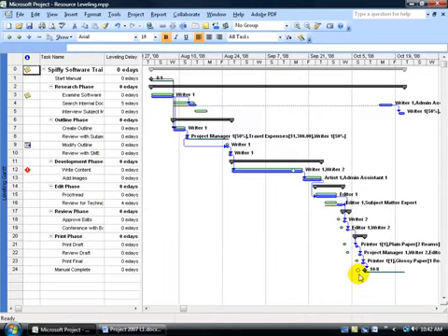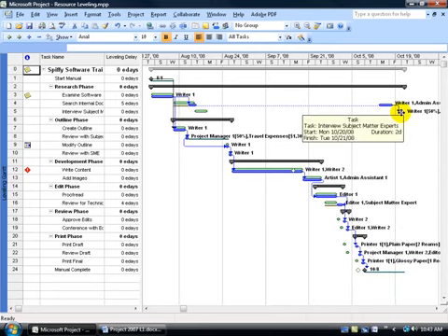Again, its original pre-level date was October the 6th, and then because of the sequential successors here, it breaks it down to October the 8th, but we have a split task that goes beyond October the 8th, so the milestone here, when the project finishes, has some slack time that goes all the way out until that October the 21st, which we see when we hover over the last task here, that ends on October the 21st.